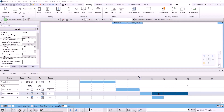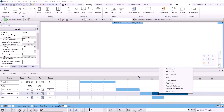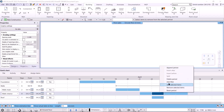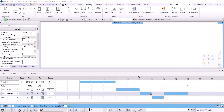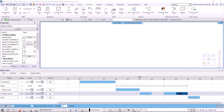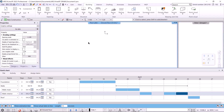We can also split these periods in half. This means that if, for example, the inner walling was built for 4 days but there was a day break between them, I have to split this period to be able to move them away from each other. So I right-click and choose the split command. If I delete this period, we can see that the inner walling lasted for 3 days; however, there was a rainy day when the workers could not work, so the total duration increased to 4 days. I am going to move the roof construction to the 25th and divide this period in 2 so I can assign different walls to them. We have already created the activities and periods, now we can move on to how we can assign elements to them.